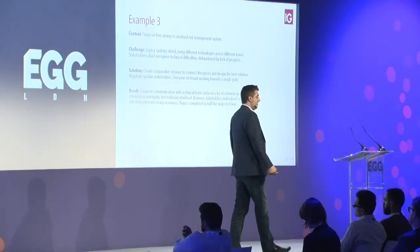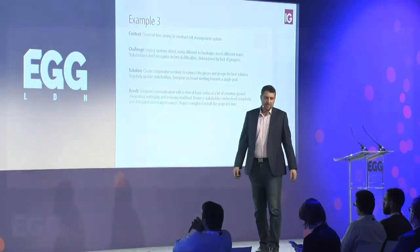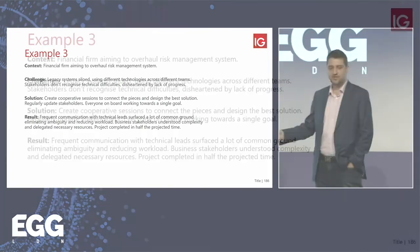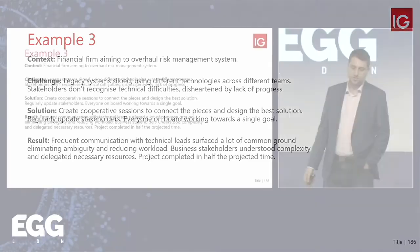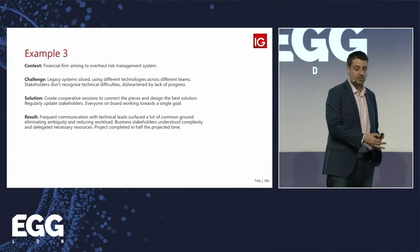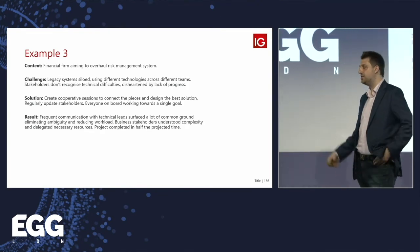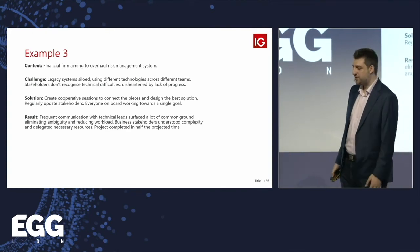Second example: a marketing firm wanted to build a knowledge graph with every customer touchpoint in order to build a next-action recommendation system. The challenge was too many resources needed and value not clearly defined. The solution was to restructure the project with specific use cases attached to a dollar sign — showing uplift against cost. Once stakeholders saw the money, they were much more eager to discuss it, and the project was delivered with a significant revenue increase. Third example: a financial firm trying to overhaul its entire risk management system — typically legacy, siloed across teams using different technologies. The solution was simply to talk to people, create cooperative sessions, bring everyone on board, and connect the dots toward a single goal. The result: people found that a lot of planned work had already been done elsewhere, and they brought it all together in half the projected time.